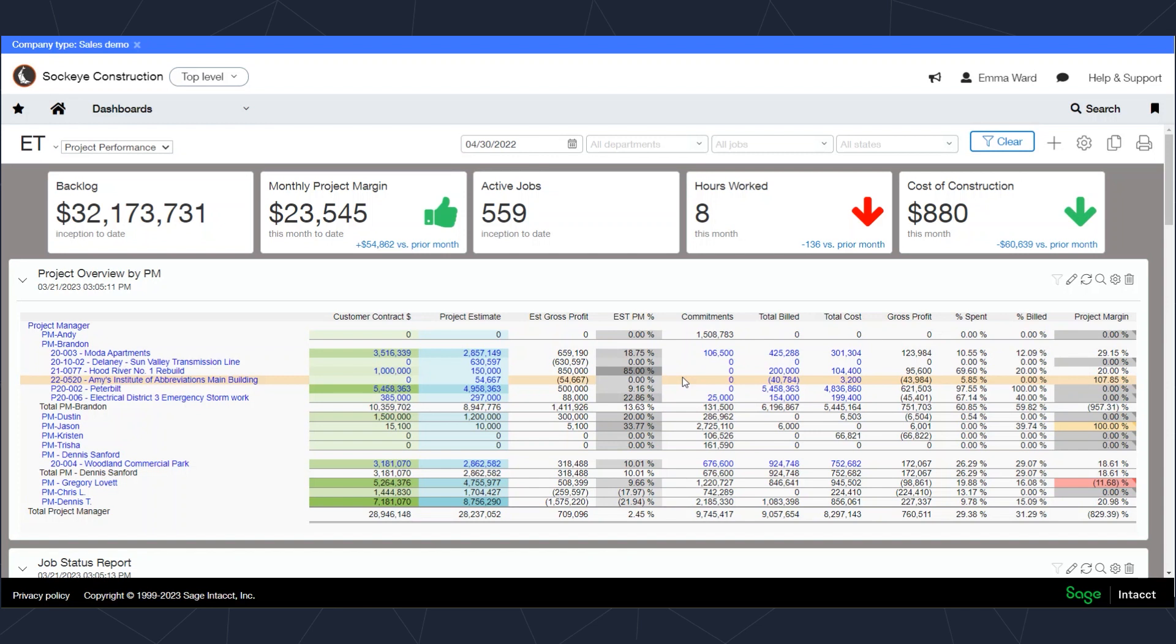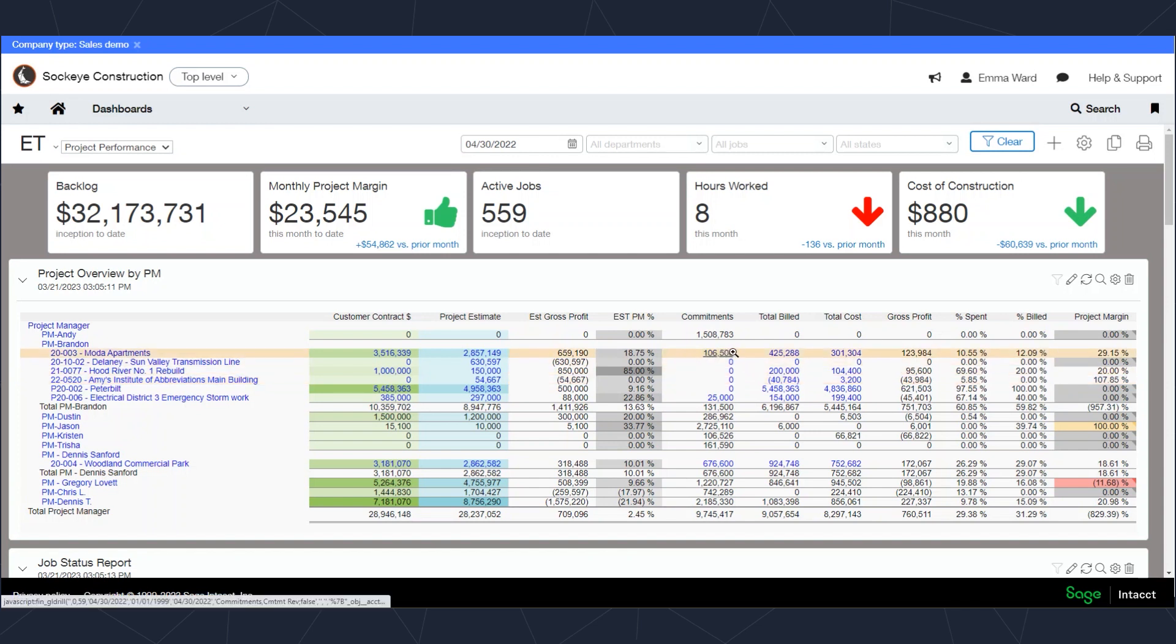To start with, I've added commitments, so these are going to be open purchase orders or subcontract agreements. When you book one of those types of transactions, it's going to automatically commit that dollar value to the job itself. When the invoice then comes in, it's going to reduce the commitment and move the cost to the total cost column.